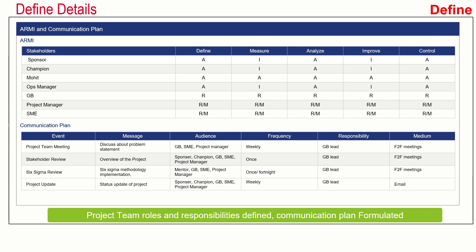The team also created a communication plan in which events were decided — project team meetings, stakeholder reviews, Six Sigma reviews, and project updates. For each event, the plan specifies what message will go out, who the audience is, the frequency of communication, whose responsibility it is, and the medium — whether face-to-face meeting or email.